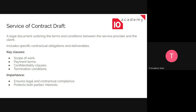The second document is a Service of Contract — there's a draft one. This is just a legal document which outlines the terms and conditions between the provider and the client, or the consultant and the client — so you and GIZ. It includes specific obligations and deliverables. The key clauses are scope of work, payment terms after evaluation, confidentiality, and termination conditions.